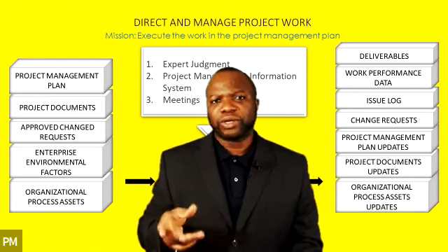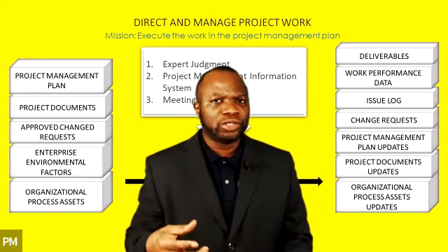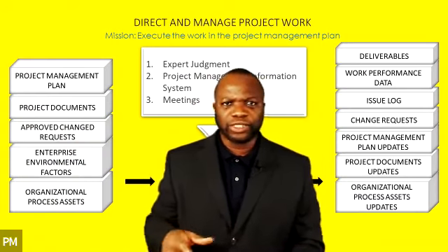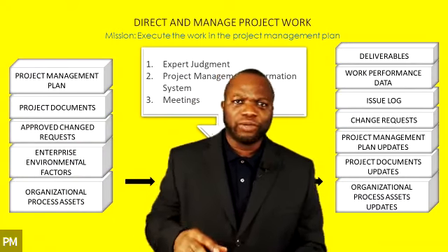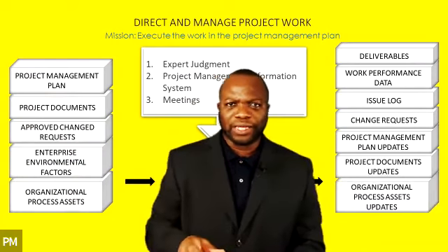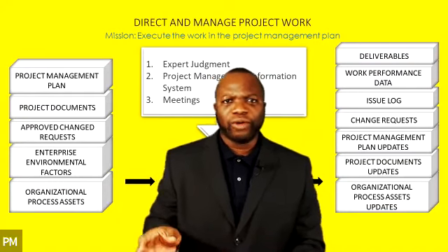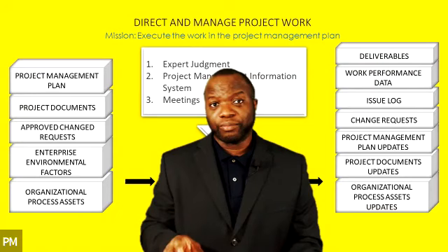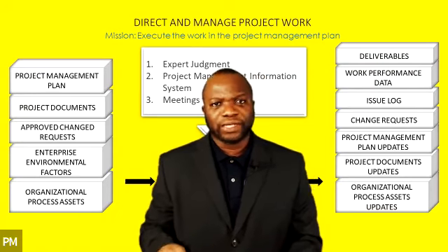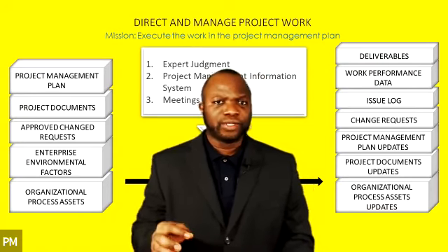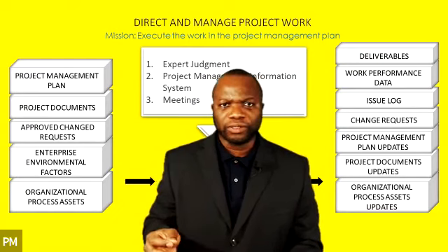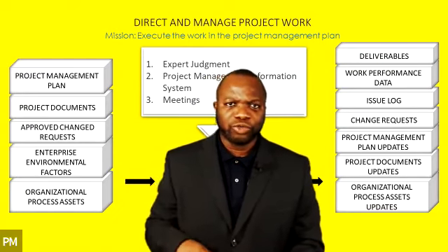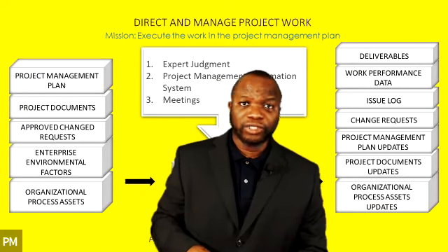But a project document is a document that you use for the upkeep of the project. It's not a plan. It's a document that you use to keep things aligned and straight by way of data that could change. For example, a project schedule is a project document. You update the schedule, you modify the schedule, you change it.